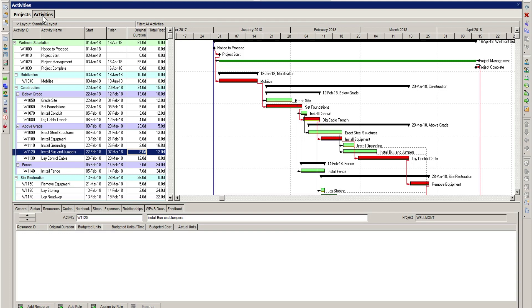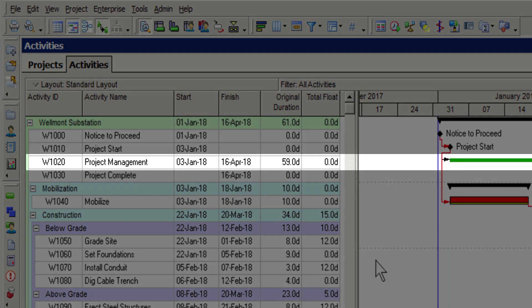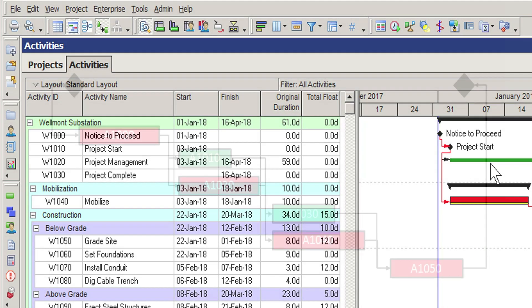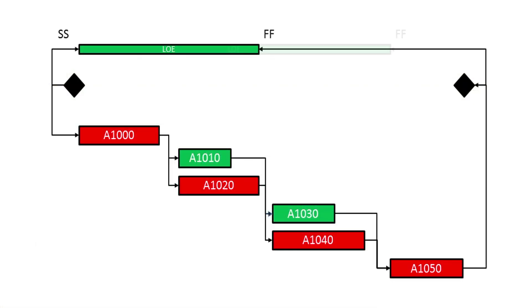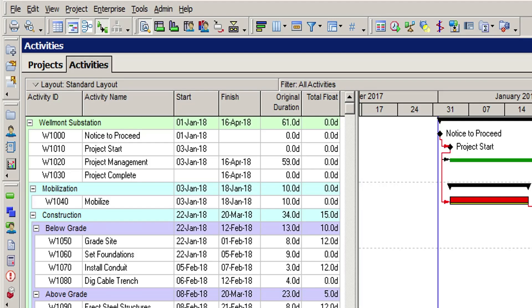As we've already stated, the resource assignment may influence the overall duration of the activity. In this first example, however, we are assigning the foreman full-time to the project management activity. This is a level of effort activity whose duration is determined by the activities to which it's linked. Level of effort activities are linked to other activities using a start-to-start and a finish-to-finish relationship.